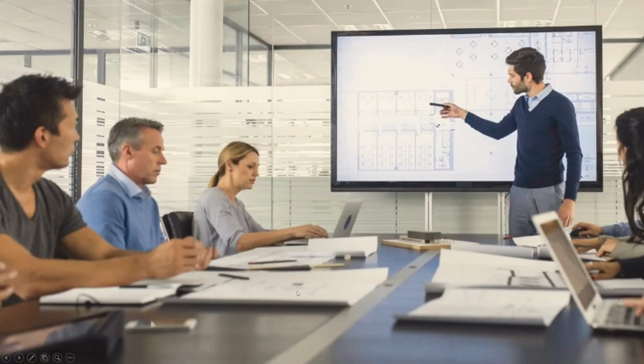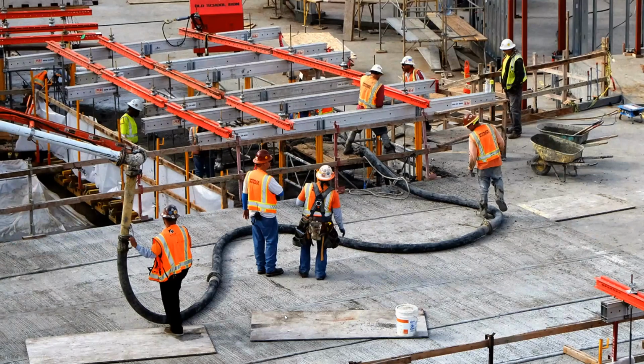When you think about it from a quality of life, because these same RFIs can just completely bring work to a stop. And when you stop work, obviously you lose your flow. You have to start moving people around to work they can work on. The resource management can go out the window. People that were supposed to be off the job are still on the job, or you may shift them off and then start pulling off the bench of people that are unfamiliar with the project.